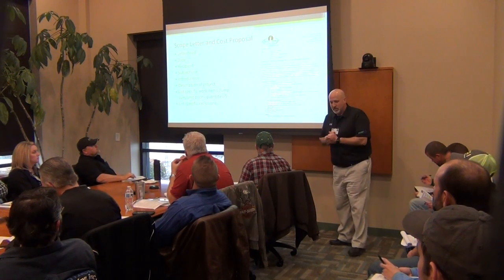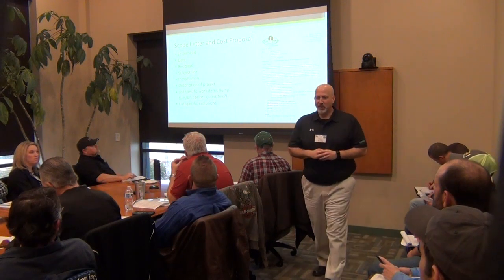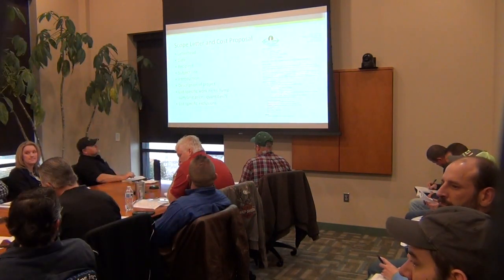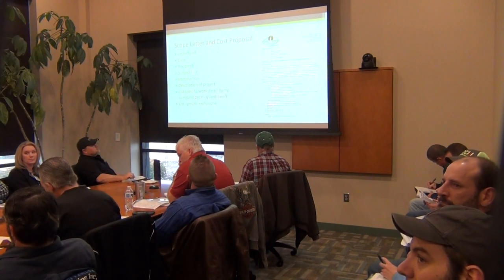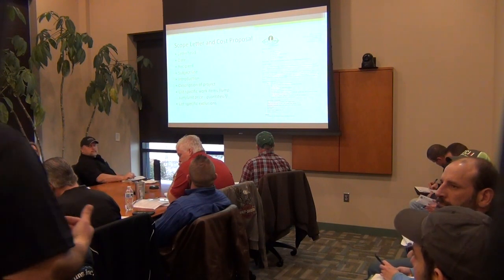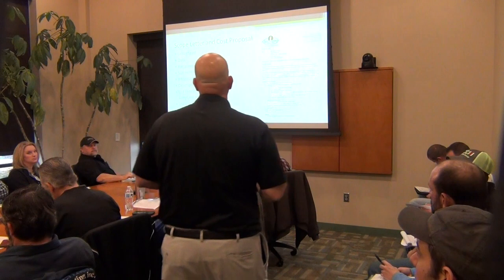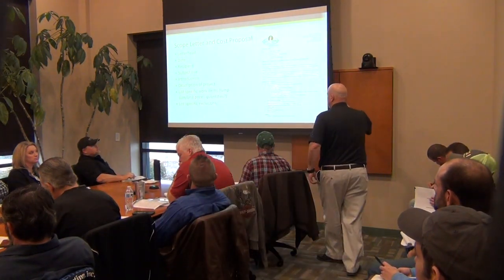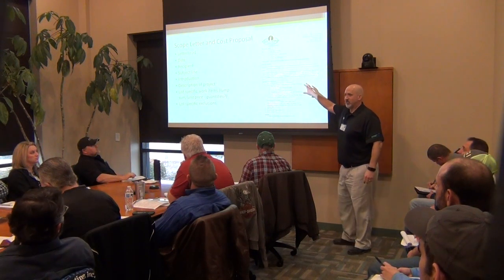That's another example of getting too specific. I see some people tell them, hey, I've got overtime included in my bid. There's a time and a place for that. If the job requires overtime, and it says it in the scope of work, hey, we require you to work 5 10s, then you want to validate that. I've seen some estimators think that overtime is needed, right? They put it in their bid, they put it in the scope letter, and what happens at the end of the job if the overtime is not used?